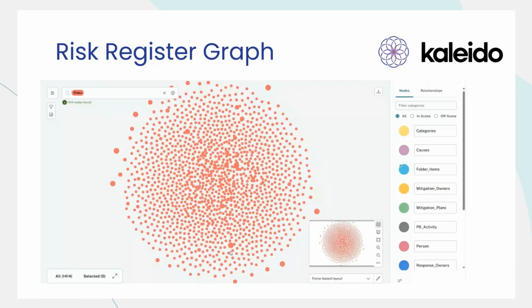So the risk database captures all of the identified risks associated with the project. It includes detailed information about the nature of the risks, such as the causes, impacts, probability of the risk occurring, and mitigation strategies. And then there's the schedule database.